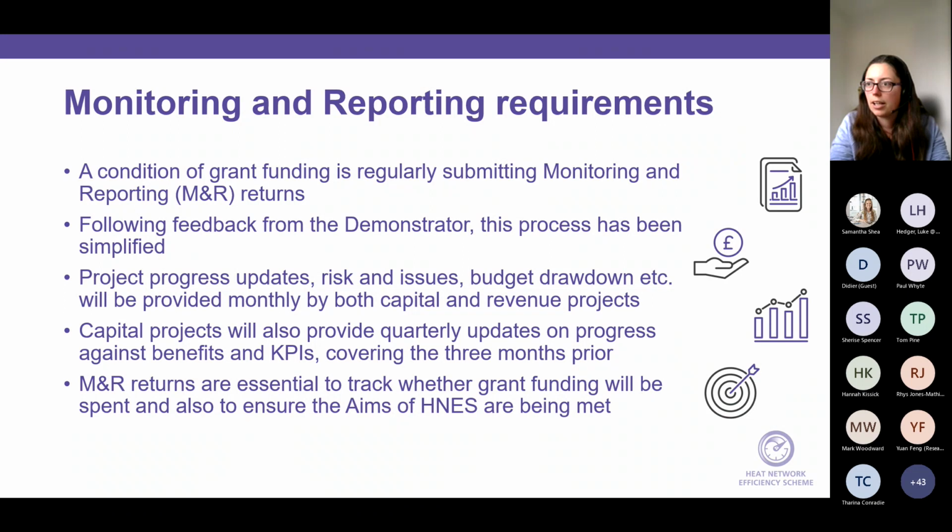For anyone that's not a local authority, the funding will only be paid out after we've seen evidence of work being completed. So, for example, like I say, an optimization study, or in a capital project, it might be invoices for purchasing particular pieces of equipment.